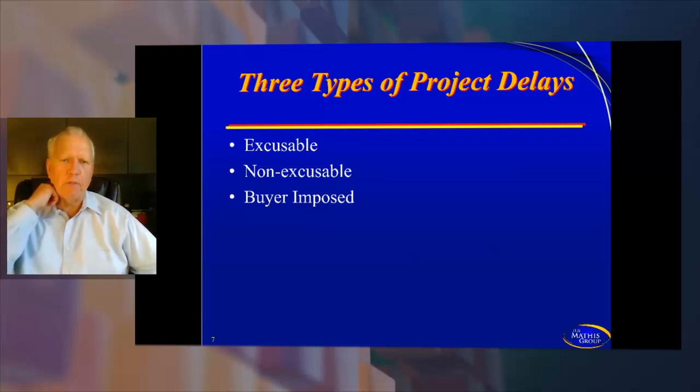So let's say, for example, you are overseeing the project at one of the power plants, and they're doing maintenance, and you've got a vendor in there doing the maintenance. And when they open up the section in the power plant, you discover that there is a flaw in the turbine that generates power. Well, nobody knew there was a flaw. Nobody anticipated that. That was not part of the original project. And so now that you know it's there, you're having to create change orders to be able to take care of that.